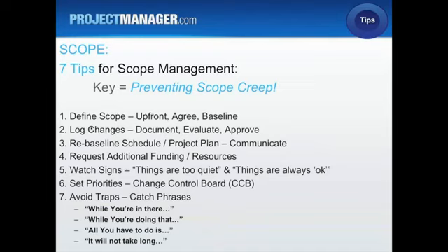And for most companies, that process is not such a quick thing. So you have to allow time, and that also needs to be defined in your change control process: what is the process for the funding? Because you don't want to be scrambling trying to figure it out along the way or in real time. You want to know up front when that happens, what is the flow, who do you go to, who do you submit the funding to, who's going to evaluate it, who's going to approve it and release it.